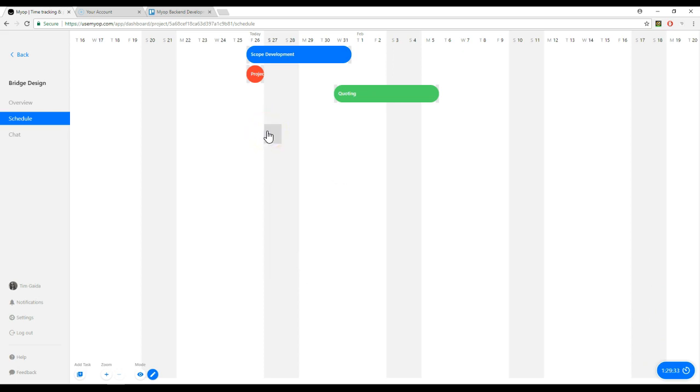Okay, now on to splitting a task. In edit mode, click on the task you want to split and click the Split button. You will now see that a gray version of the task pops up. You can now drag that task to the appropriate date. You can do this as many times as you want. In my example, the project meeting I am splitting occurs every Friday.